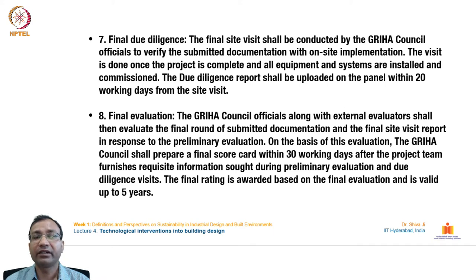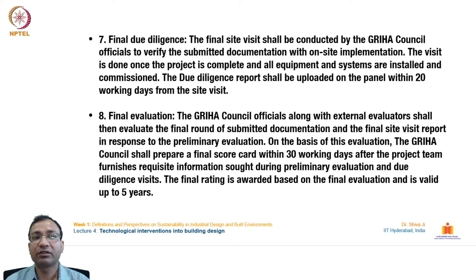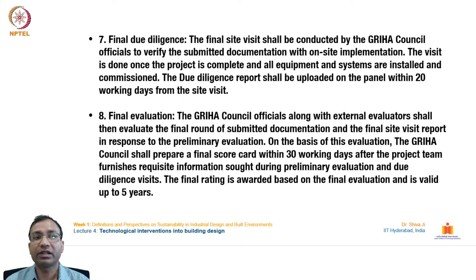The final due diligence site visit is conducted by GRIHA council officials to verify submitted documentation against on-site implementation, done once the project is complete and all equipment and systems are installed and commissioned. The due diligence report is uploaded within 20 working days. GRIHA council along with external evaluators then evaluate the final round of documentation, and a final scorecard is prepared within 30 working days.